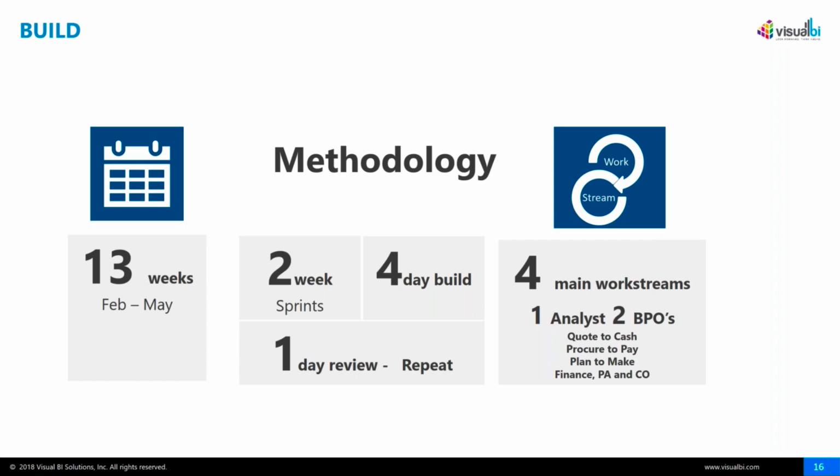So 4 days to build and then 1 day to review, and then repeat that. We had 4 main work streams: quote to cash, the production and quality side of things, the finance side of things, and then the materials management / plan to make side of things.